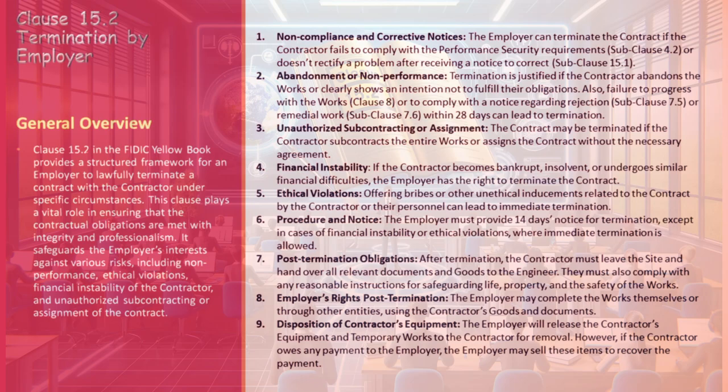Procedure and Notice: Generally, a 14-day notice is required for termination. However, in cases of financial instability or ethical violations, immediate termination is permissible. Post-Termination Obligations: Following termination, the contractor must vacate the site, hand over all relevant documents and goods to the engineer, and adhere to instructions ensuring safety and security.